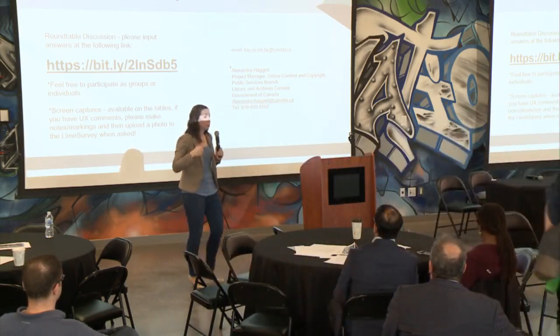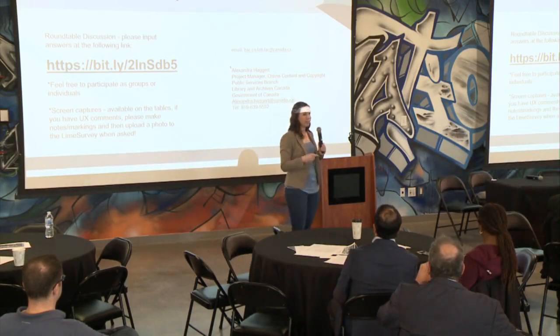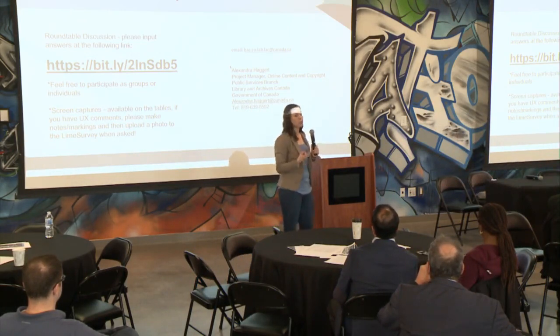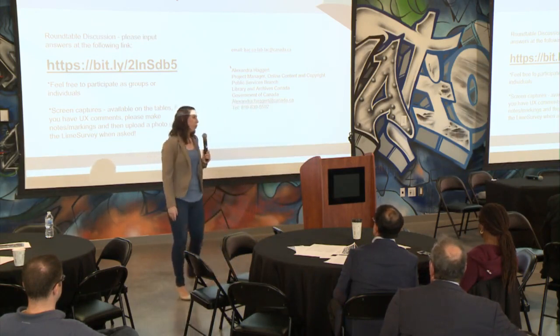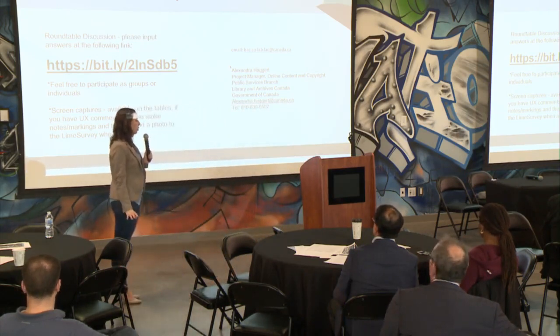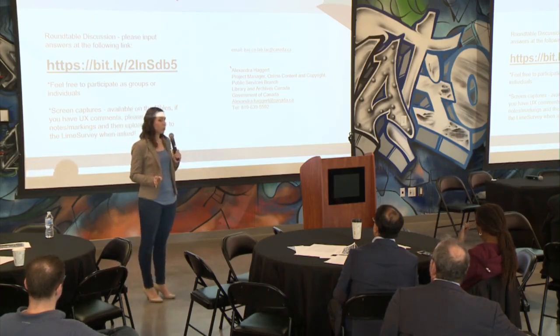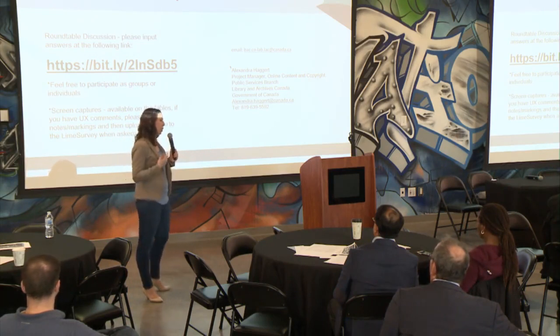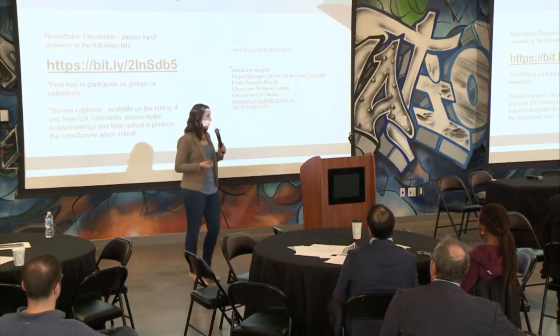But I will say that we do have this opportunity because the Collection Search Beta project is an agile project. And they're doing 2-week iterations, so 2-week cycles. They've been going for about a year and a half, almost 2 years. And the Collection Search Beta, they took over a year to get to their minimum viable product, but now it's out there and they are continuing to do these 2-week iteration cycles. And it's incredible, the amount of work that's being done.